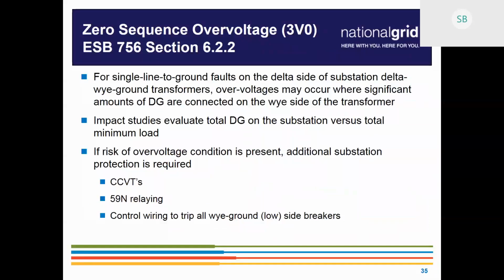So let's say it is required for something between 250 and 500. Does the evaluation of the proposed effective grounding have to occur during the impact study? It has to occur during an engineering review. So it might not be an impact study. It might just be a supplemental review. That's what I believe those are intended for in the tariff: a check of one or two specific things that we need, but it doesn't require the whole 55 days. So that would be where you would see it go, a supplemental review. Got it. Thank you.